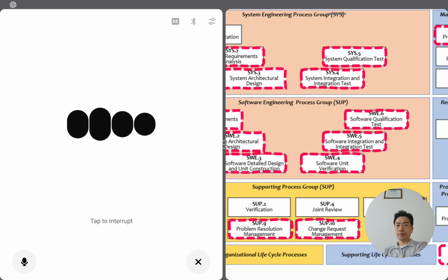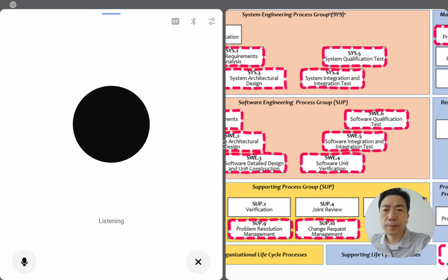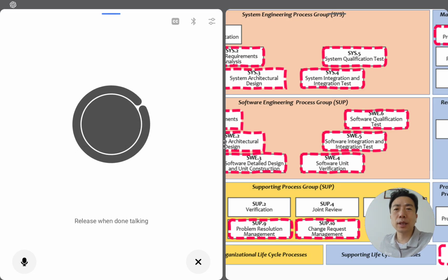Got it. Open, in process, resolved, closed. Yeah, that's even clearer. It matches how most issue tracking systems work. Open means the change is logged. In process means someone's working on it. Resolved means the fix is done and verified. Closed means it's fully approved and archived. That flow fits ASPICE perfectly. Simple, traceable, and easy to audit.